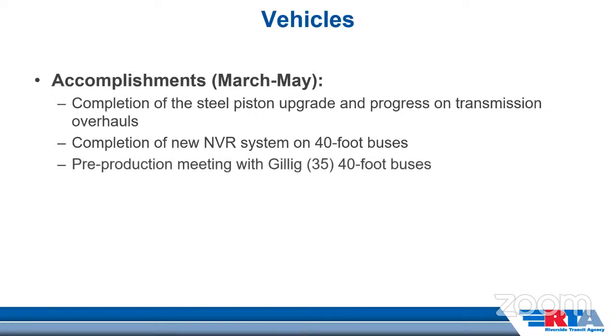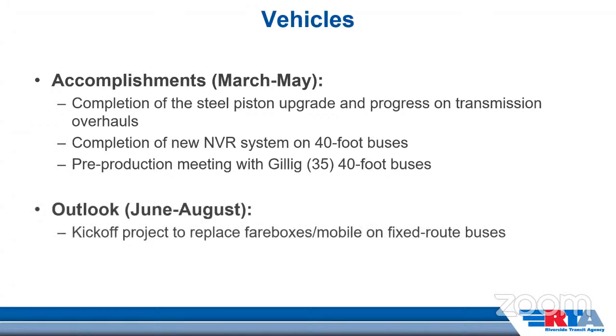As you may remember, we do have an order in for 35 brand new 40-foot CNG buses with Gillig. Staff did participate in a pre-production meeting over the spring that laid the foundation and the timeline for that bus build. It is expected to begin in November of this year with those buses slated for delivery in spring of 2023.